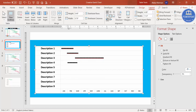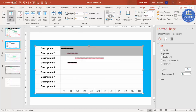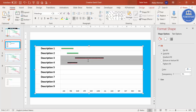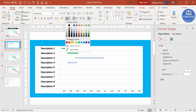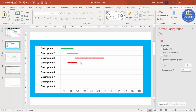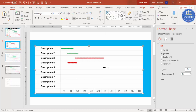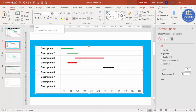You can also change the color of each bar. For completed tasks, highlight the 'g' characters, go to Home, and change the font color to green. For tasks not yet completed, change the font color to red. Remember: always make sure the font is set to Webdings; if you select any other font and type 'g', it will just display the letter g. Webdings is available by default in Microsoft PowerPoint.